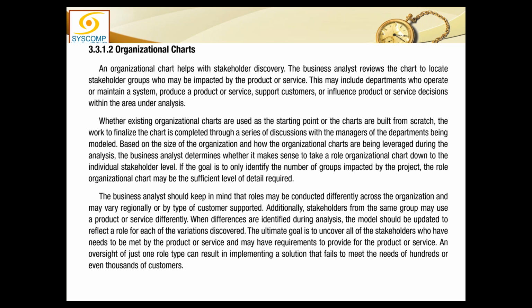While existing organizational charts are used as a starting point or the charts are built from scratch, the work to finalize the chart is completed through a series of discussions with the managers of the departments being modeled. Based on the size of the organization and how the organizational charts are being leveraged during the analysis, the business analyst determines whether it makes sense to take a role organization chart down to the individual stakeholder level. If the goal is to only identify the number of groups impacted by the project, the role organizational chart may be the sufficient level of detail required.